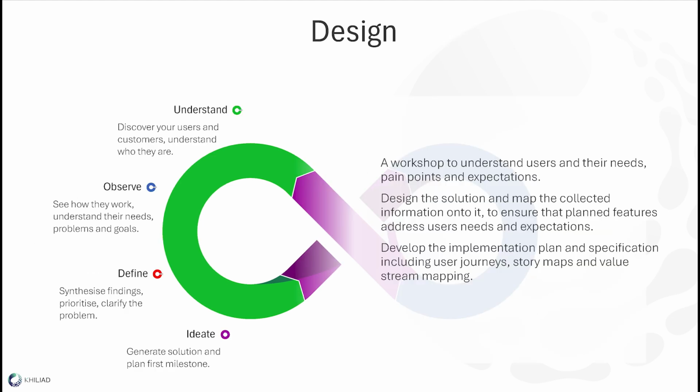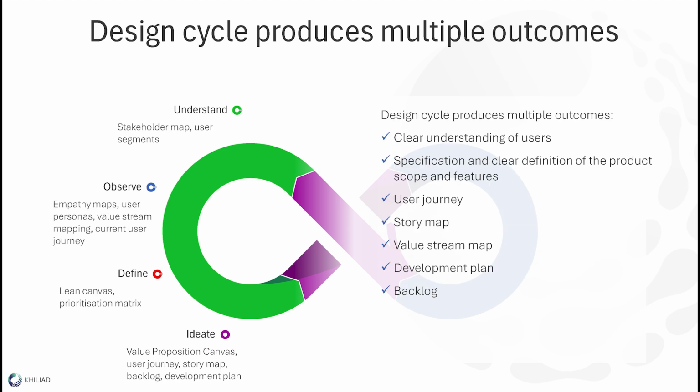We start from all those 4 phases, usually a workshop, usually 1 to 2 days to design the solution, to design the backlog. When we start the project, this will be longer. This may be 2 days. Later during the project, when we need to understand the next feature, the next thing, it can be shorter. It can be just a few hour-long session. It can be sort of release planning, feature planning. It doesn't matter how you call it, but essentially that's the point behind it.